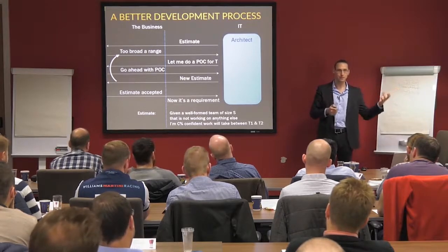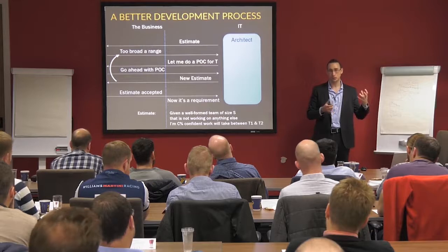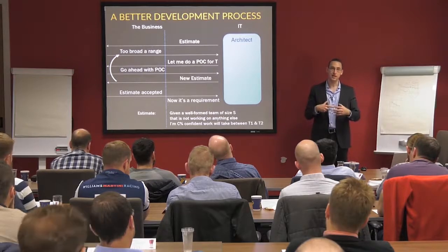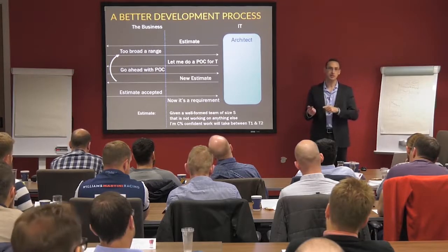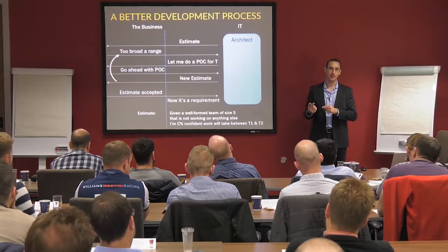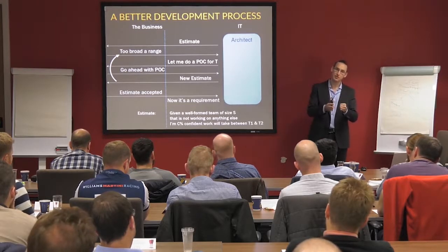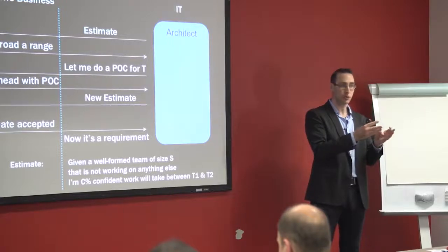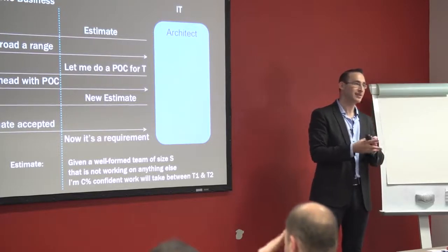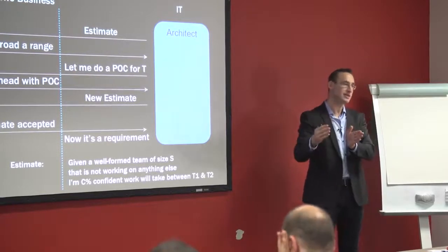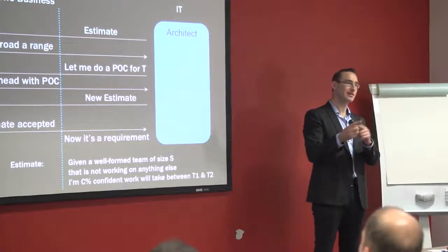So I'd say that the most important thing that we've discovered internally is just how rigorous we need to be around scoping of the thing. And to say, deliver the smallest thing possible before doing anything else. And then the next incremental unit needs to be examined independently of that.